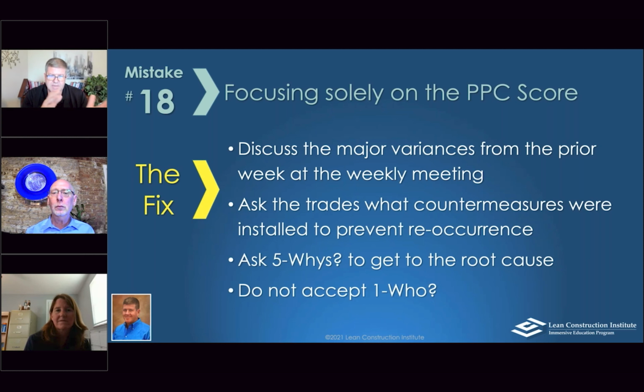But then the make ready planning kicks off each week with the updated 6-week look ahead. Typically, now I've got some international stuff that they're doing 12-week and 20-week look aheads because it takes that long to get a light bulb from the US to Africa. But for us, US, typical 6 weeks, going through that is a process, and you're always adding a new week.